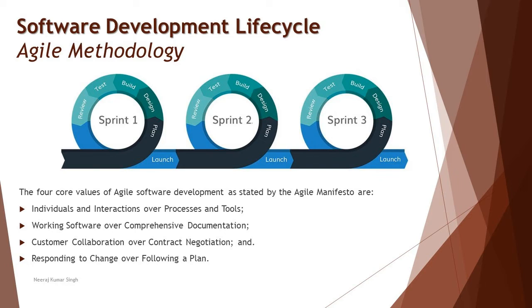Now, what exactly makes Agile different is the way iteration works here. Most important thing to understand is I may have a particular product being broken down into multiple releases, or even if I have just one release, I won't be working on the entire product at a time. I'll break that into simplified releases. Each work requirement also will be broken down similarly into different work items like epic, story, task, subtask, etc. Making it simplified makes your job much easier to understand the minute information about each activity and how you can work on it.